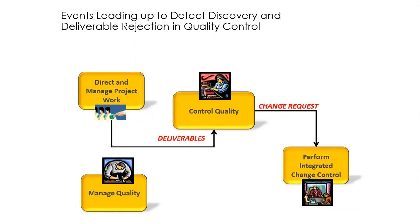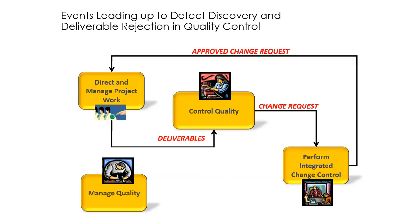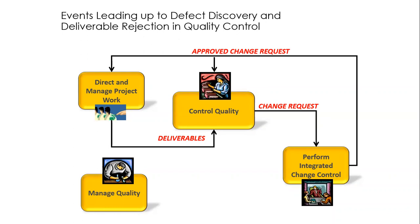The change control board — or it may not be a change control board; it might just be a sponsor or a project manager, because not every project needs a change control board. Assuming we do have a change control board in this example, they will review the change request and let's say they approve it. It gets put into a change log. The approved change request becomes an input back into direct and manage project work and also into control quality, so that on the next go round we will execute in direct and manage project work and check what we have produced in control quality, and hopefully this time it will fit the bill.